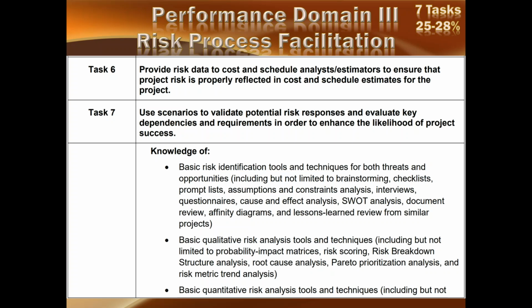Because if I have proactively defined all these scenarios, then I am well prepared to encounter these risks. What knowledge do I need to have? First of all, basic risk identification tools and techniques for both threats and opportunities. Positive and negative risk, both I have to have. I have to be highly proactive. I have to be highly creative, including but not limited to brainstorming, which is a creativity tool, checklists, prompt lists, assumptions, constraints analysis, interviews, questionnaires, cause and effect analysis, SWOT analysis, document review, affinity diagrams, lessons learned review, and so on and so forth. And I can even take help from the previous similar projects.